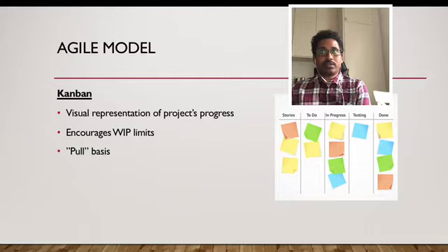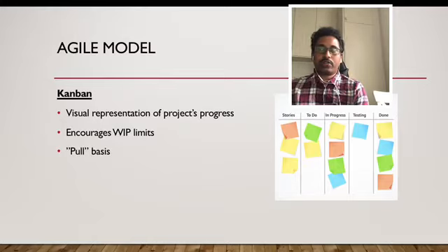And in this we can see work in progress is limited, which means, for example, if you see to do, they have 2 tasks there on the board. They set a limit on the number of tasks an individual should perform, so that there is more productivity and the person handling the task has more focus. For the columns they have, they can set the limit to 4 or 2, depending upon how focused they want to be.